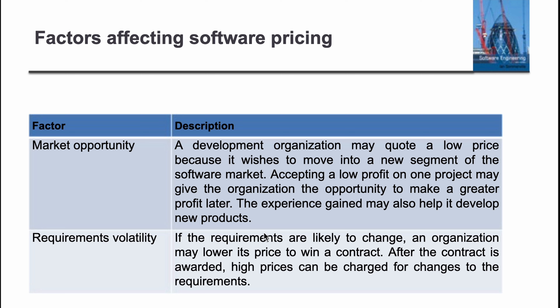Requirements and volatility: if the requirements are likely to change, an organization will load its price low to win a contract. If we know requirements can change in future, we say our price is this much and we will develop the software for you. But when requirements change, the price will increase. After the contract is awarded, high prices can be charged for changes to the requirements. This is smart work — we get the customer into the contract, and after that we charge more.